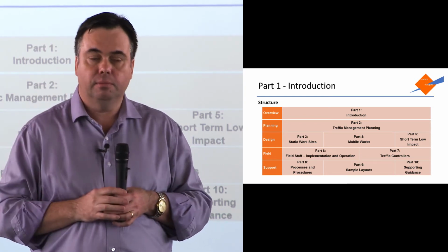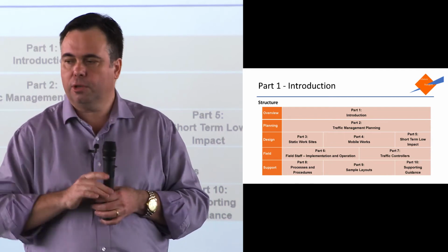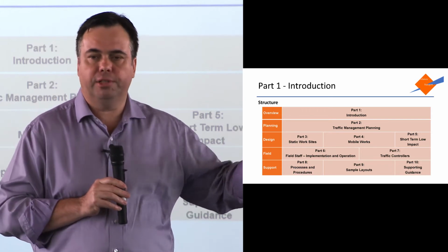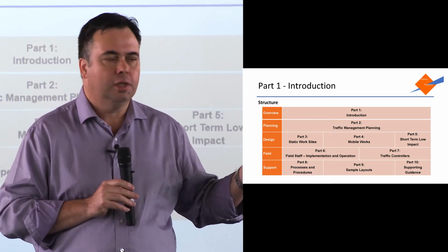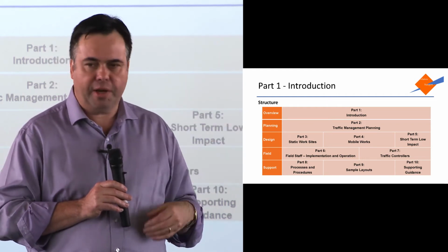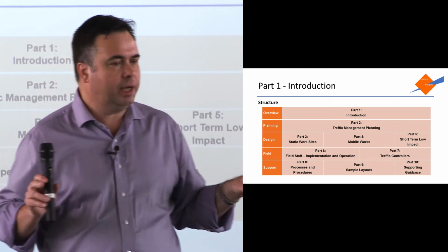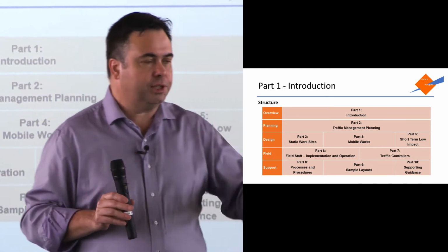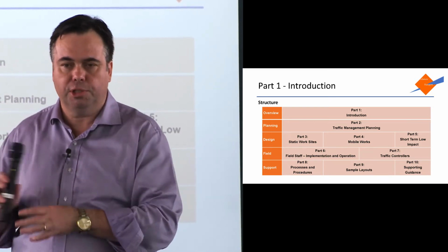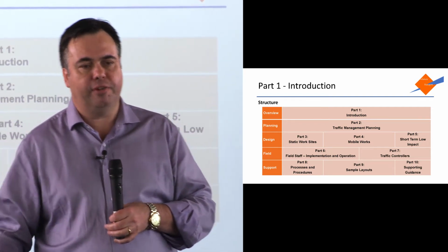Where's traffic going to go? This is where you tell the local road authority, State Growth or local road authority, whoever they are, I'm going to reduce this road from 3 lanes to 2 or from 2 lanes to 1. I'm going to put cyclists here, pedestrians here, these local residents that are affected, this is what I'm going to do for them. You just start telling a story before you start doing up the designs. Because if the local authority comes back and says, no, you're not doing that, well, you've wasted all your time doing the designs if you've done traffic guidance schemes before. So this is the planning phase of the job.